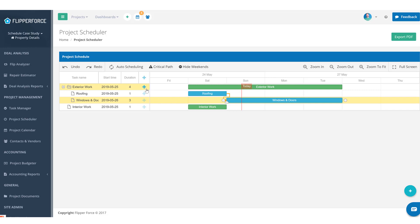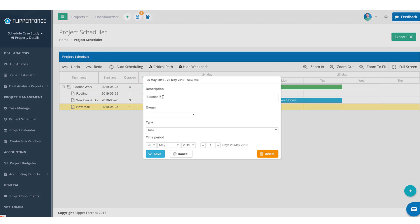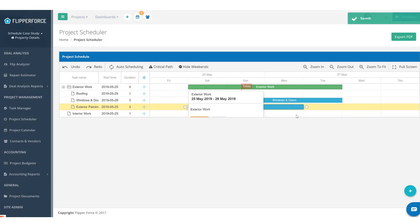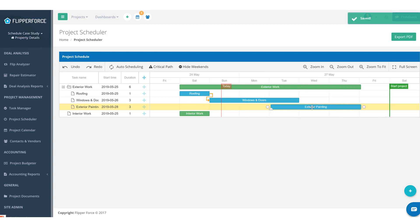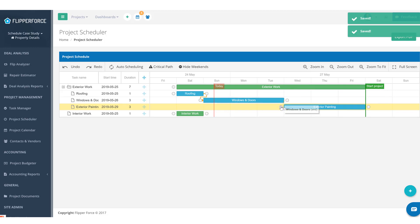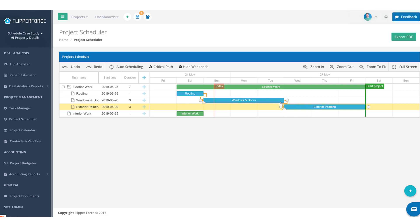After windows and doors are installed, we can paint the property, so let's add in exterior painting. Exterior painting is probably going to take between two to three days, depending on how much prep work, caulking, taping, and masking needs to happen to the siding. Let's plug in three days for painting. Painting can't start until we get windows and doors completed, so we'll drag a connector from the end of windows and doors to exterior painting.